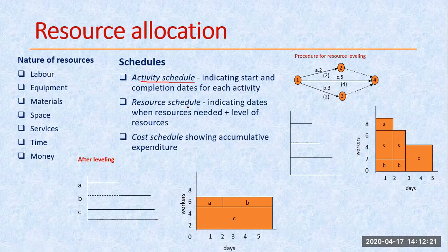Another one is the resource schedule. Similar to the activity or task sheet, we are making a resource sheet, and once we prepare that resource sheet, a chart is generated related to my resources, showing how much these are utilized. These are bar type charts. They are showing me when a particular resource gets utilized, or which particular activity this resource is used for.